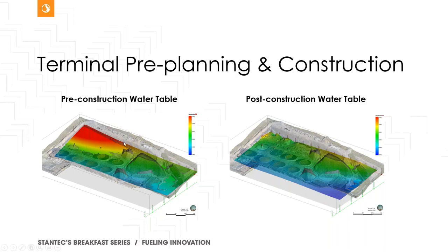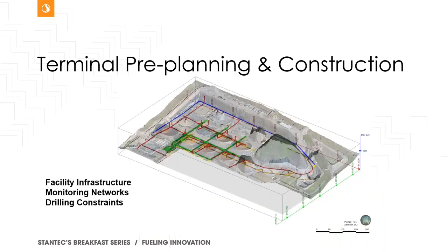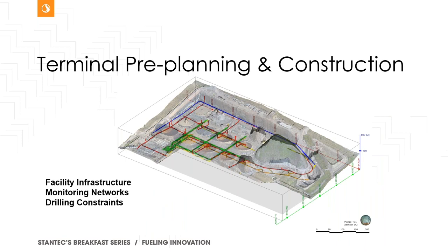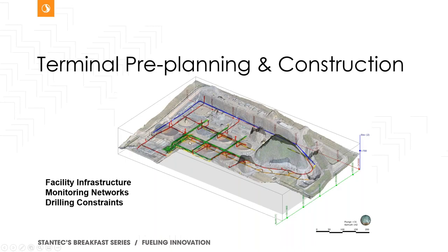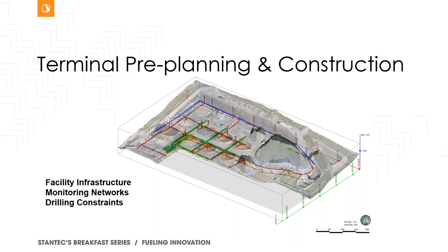So what we did was we used this 3D CSM as an opportunity to develop it site-wide, but with a focus on this wet corner in order to design a dewatering system that intercepted some of those sand seams, coal seams, etc., that were causing acute problems for the construction. And this is just another quick slide to show that once we had sort of got the dewatering and the water aggression issues under control prior to their installation of this blue weeping tile, which in the end during standard operation would suffice to dewater that corner. We've also implemented some of the piping between tanks as well as the fire suppression system piping. So not only is it good for the geology, but at some point you can start looking at the facility infrastructure, the drilling constraints that imposes on some of the monitoring networks, etc.